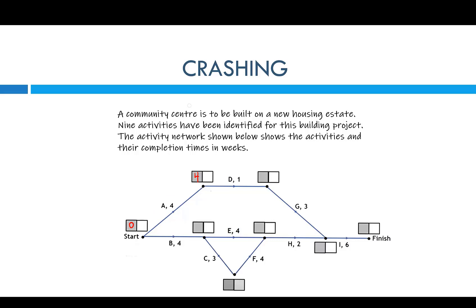Zero plus four gives me four — just looking at the left-hand side first. Four plus one gives me five. Down here, zero plus four gives me four. Four plus four would give me eight for that one, but I've got to take the longest way to get there. Going down here, four plus three gives me seven, and seven plus four gives me eleven. So eleven goes in there instead of eight because there are two ways to get there — forward scanning has to be the longest way. So we get eleven here, and eleven plus two is thirteen.